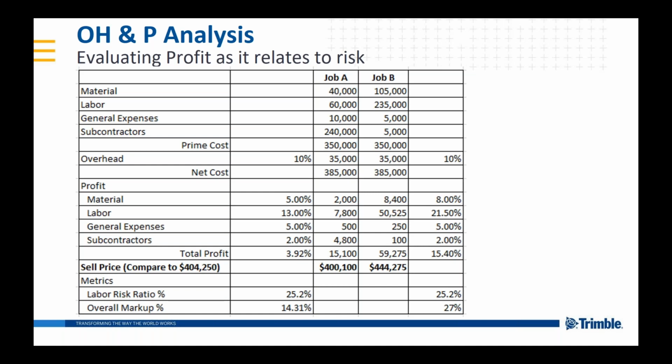And then we talked about working in a hot or cold area. I'd probably add 10 to 30% based on the temperature range that it really is. You can get some very, very cold days in the north, and I don't know that 10% is going to be enough to cover you.